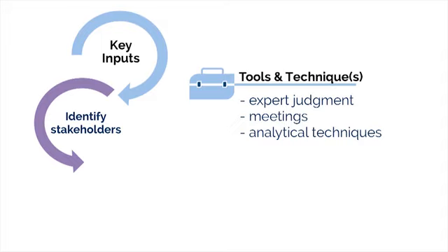Once the obstacles have been removed, it may be sufficient for senior stakeholders to change their level of engagement from leading to supportive, and then increase the level of engagement of the end users, since at a certain stage of the project, their involvement becomes more important. Meetings with subject matter experts and the project team can be very helpful to define the required engagement levels of the identified stakeholders. Analytical techniques.